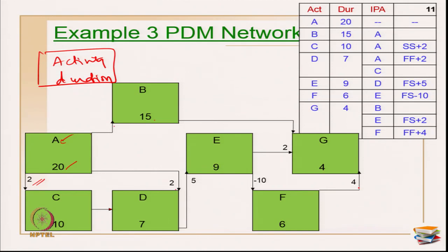Sometimes I may also have an activity name coming in here, then I have to use this combination only for that activity, and if there is something else given here, then the default relationship also has to be taken. Never try to overdo the relationships. If a special type of relationship is given, then that only takes the dominant role. If no special type of relationship is given, then the default finish-start will be the default relationship for the particular activity. That you have to keep in mind.